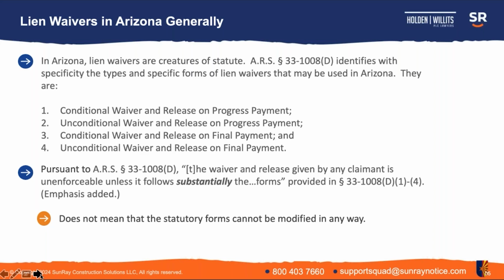Pursuant to that provision of 33-1008D that I just read, the waivers aren't enforceable unless they follow substantially the form that's provided in the statute. And the key word here is substantially, which is why I've bold and italicized it on the screen.